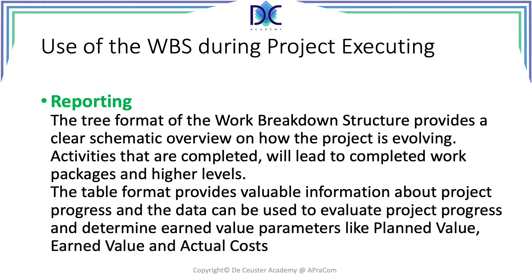During project execution, the WBS in tree form is very useful to show which activities have been completed, since a level is finished when all lower-level activities are also finished. The tree format is very visual — people can quickly see what has been done and what still needs to be done. The table format provides valuable data on project progress and allows us to determine earned value parameters like planned value, earned value, and actual cost.